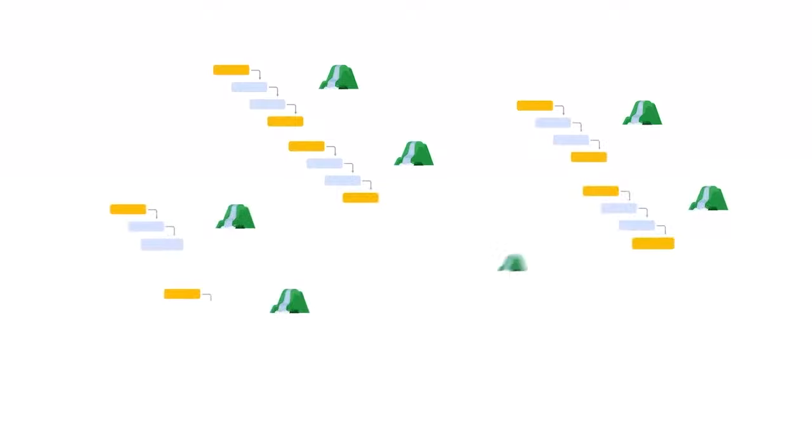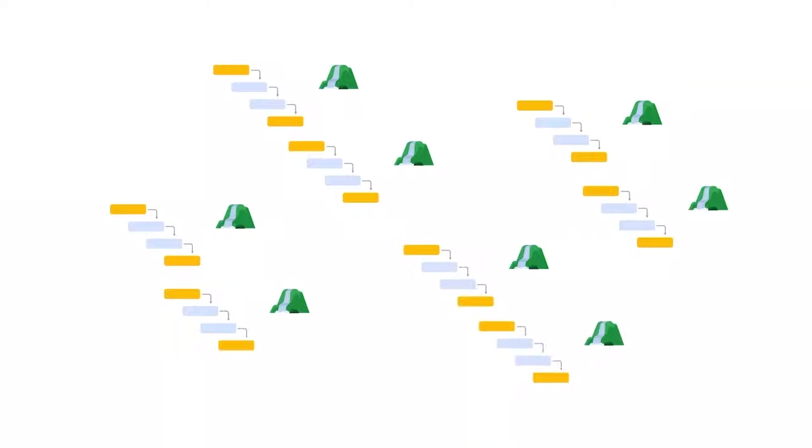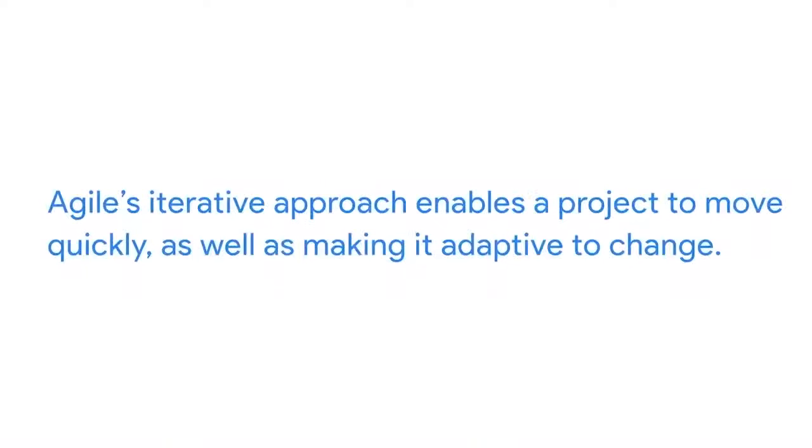In this case, the team operates within many shorter blocks of time called iterations. Individual iterations might get repeated depending on the feedback received. During each iteration, the team takes a subset of all the project's activities and does all the work required to complete that subset. You can think of it as a lot of mini waterfalls for each activity. This iterative approach enables the project to move quickly, as well as making it much more adaptive to change. So the term Agile means flexibility, repetition, and openness to change.